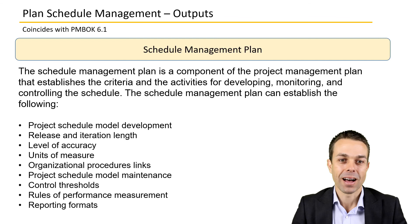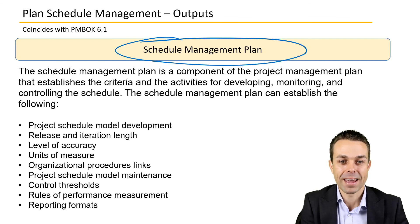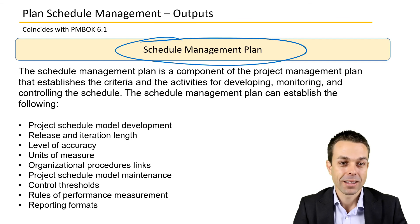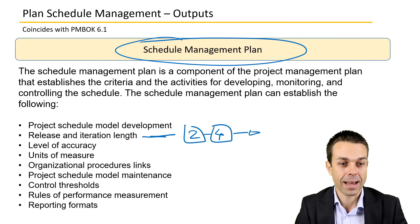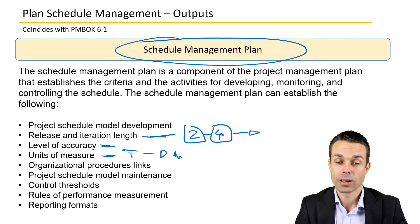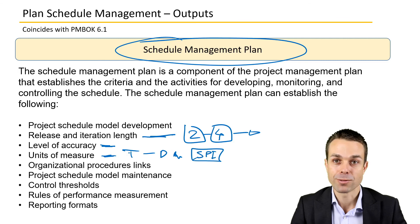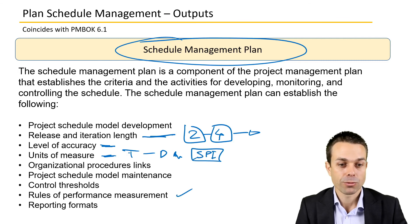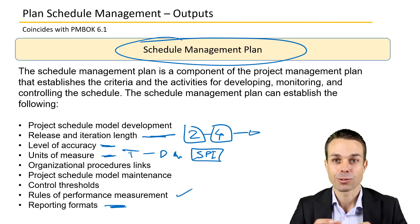The output of Plan Schedule Management is the schedule management plan itself. It establishes things like iteration length — is it two weeks, four weeks? — the level of accuracy required for activities, units of measure (t-shirt sizes, days, weeks, or months), and how we're going to control the schedule, such as using the schedule performance index. It also defines rules for performance measurement, reporting formats, and any other items related to planning and creating the schedule. That covers all the information from Plan Schedule Management as part of the PMBOK Guide.